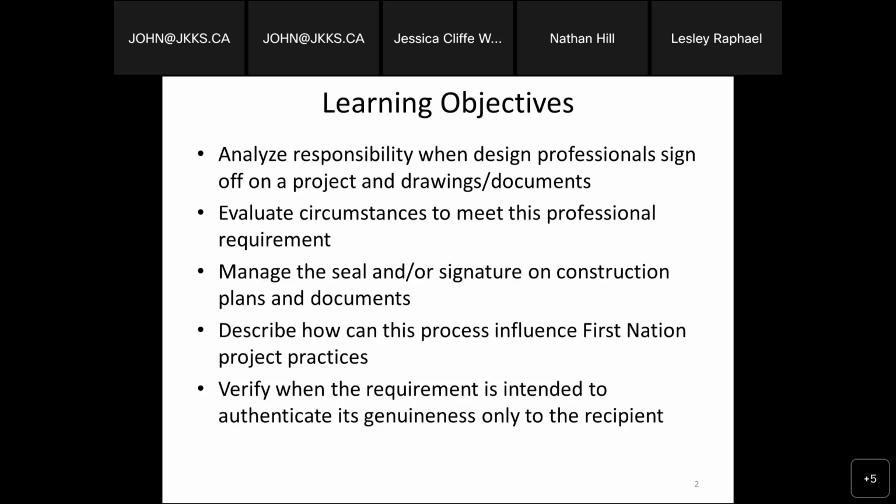So sign-offs are often the result of the project construction finalization stage I indicated earlier, where a certificate of occupancy, such as a C of O, is required. However, it may also indicate that further evidence is required for obtaining the building permit, again, as I mentioned before. It is possible that your province, territory, or community or local building department will require, for example, even house plans to be stamped or sealed by an architect or an engineer.